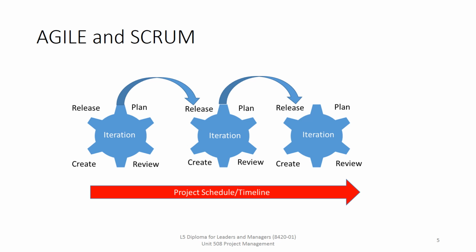Next, we'll take a look at Agile and Scrum together because they're often linked, and we'll see that as we go through. But Agile is based on short development cycles called sprints or iterations. So it's heavily focused on continuous development and improvement, and by repeating those sprints and iterations, we can improve things as we go along. So the methodology works around breaking projects into small chunks, those sprints and iterations, and each of those can be completed from a design phase through testing and quality assurance by a team, and that allows those teams to continuously release things for the next session or segment that's going to be done.